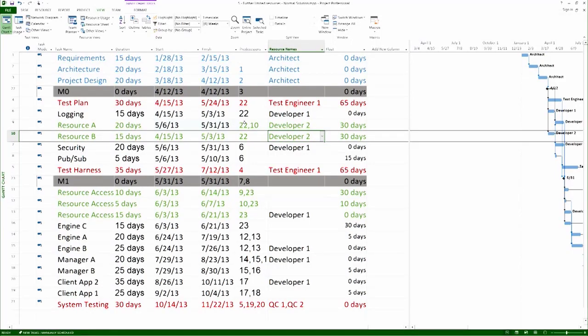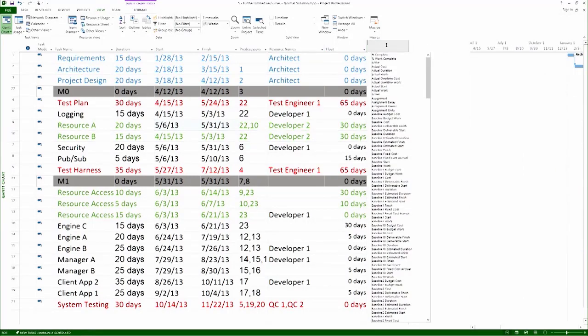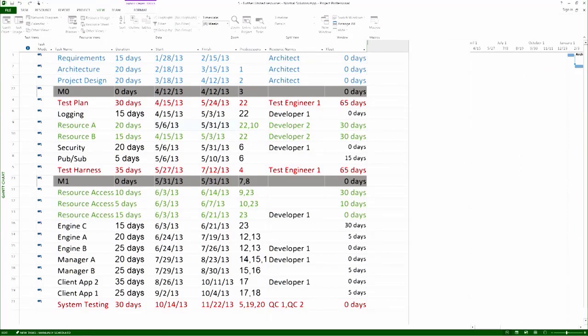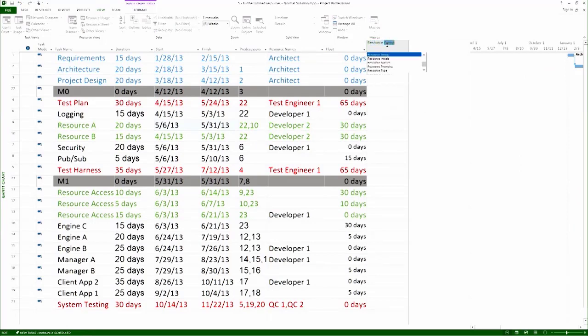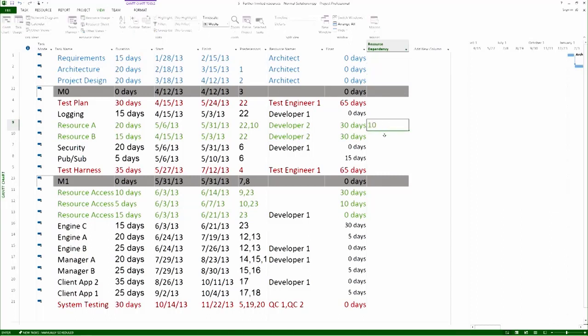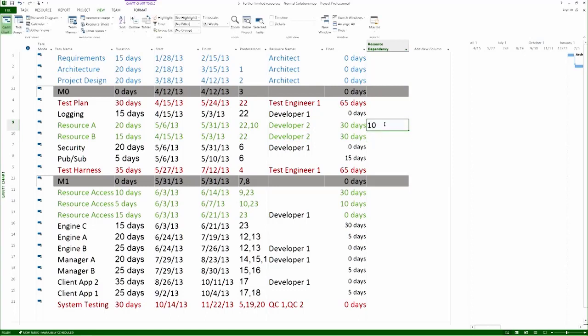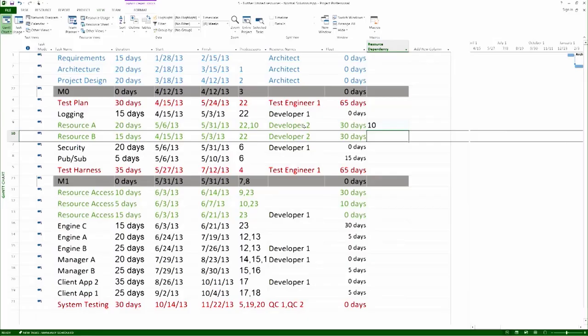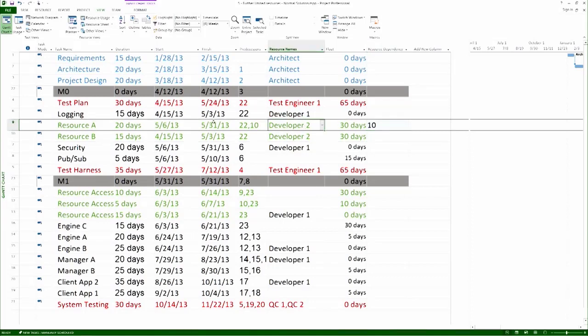Now, note I'm making 9 depend on 10, not 10 depend on 9 because 9 has more float. If I do that, project automatically schedules the activity to the correct date after activity 10 is complete. Unfortunately, I also just changed the project and nobody actually knows I did that. So, I'd like to document it. So, I'm adding another column here. And I'm going to call it resource dependency. Now, this is just a free form field I just invented. And what I'm doing now, I'm documenting the fact that dependency 10 is actually artificial. I added it because of dependency on the resource.